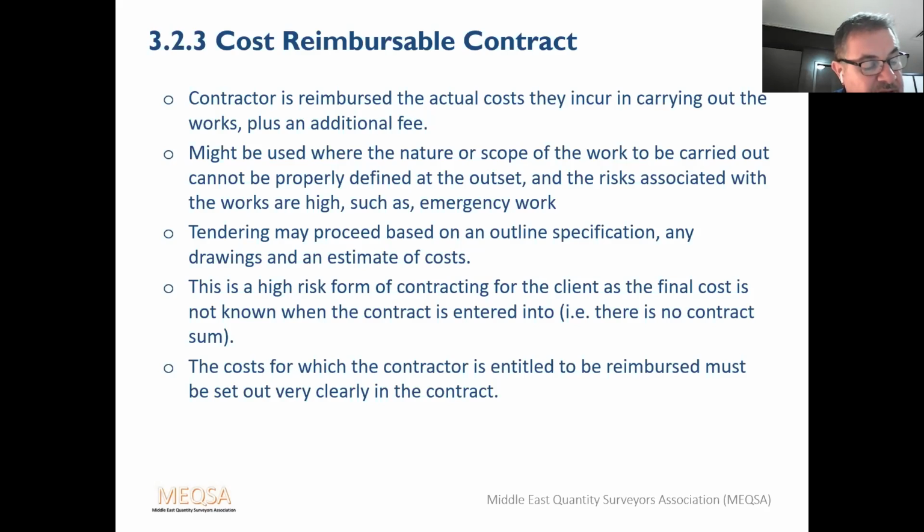The direct costs that are clearly attributable to a single project could include, for instance, the labour, materials, hired plant, and subcontractors. The other costs that might be spread over more than one project could be head office costs, staff costs, the manufacturing facilities, and owned plant. So these costs might be calculated on a pro rata basis and charged along with profits as a pre-agreed lump sum or percentage fee. In order that the contractor may contain their cash flow, cost reimbursable contracts may also allow them to charge for liabilities or for costs that will be incurred before the next interim payment.